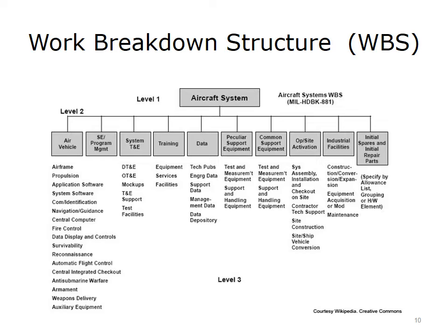An example of a work breakdown structure for a typical IT development job might show that the first level breakdown has a large task related to establishing system requirements. Often there may be another large task that would represent design, another related to procurement of products and services, another related to implementation or system integration and testing, and perhaps another one related to quality assurance, a very important activity on any project. These are simply examples of typical first-level breakdowns you might find on health IT projects.